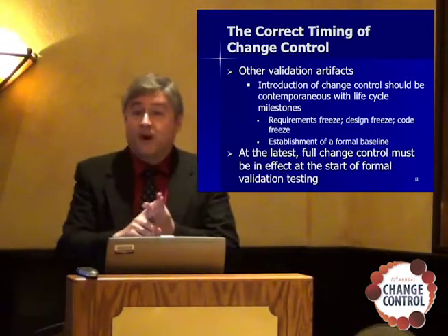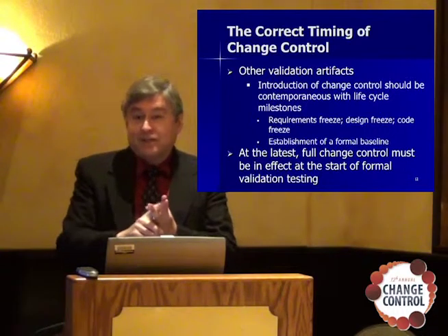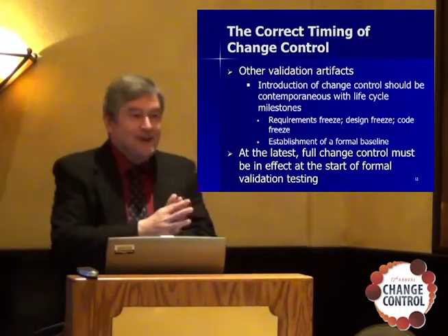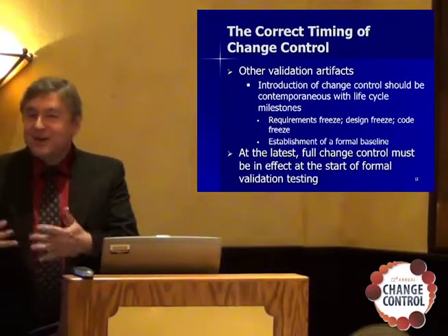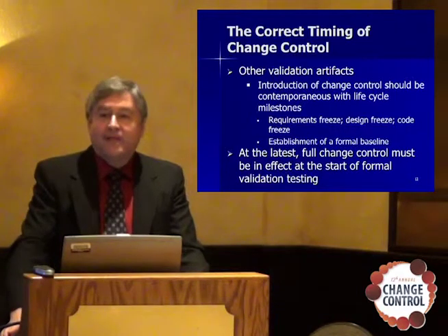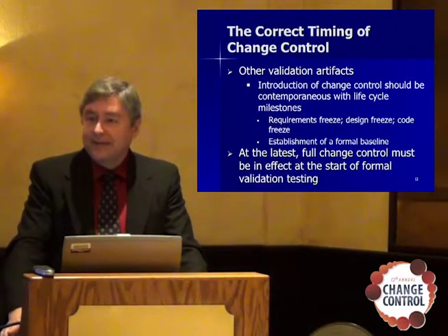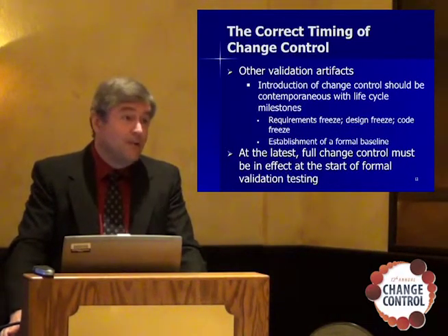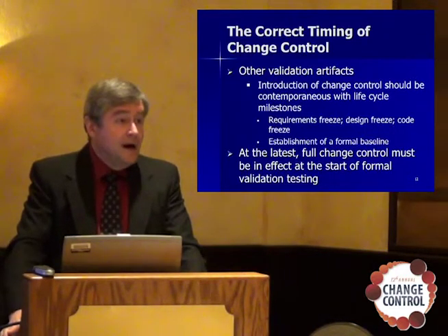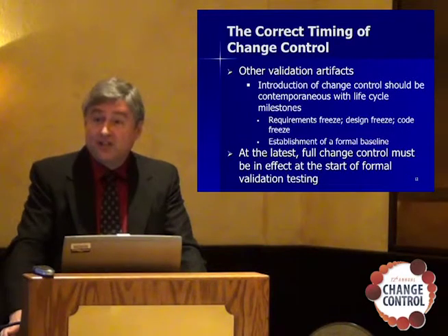This is very common in software, although we never actually completely freeze requirements. Some people talk about requirement slush, where it's sort of frozen, but it's moving around a little bit. But we still call the milestone requirements freeze, simply for the sake of saying this is where we're putting a stake down in the sand, and we don't really anticipate a lot of requirements changes after this.